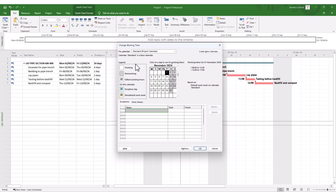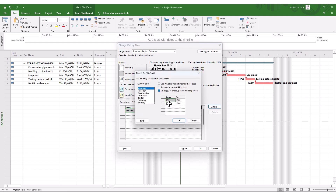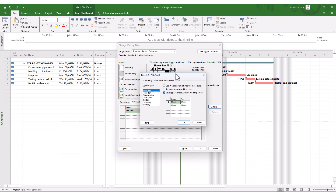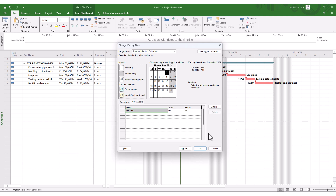Mostly, a project manager or client representative will say your calendar isn't accurate — we're going to work from 7 o'clock on a Monday, for example. So you go to Work Weeks, click on Details, and this is where you can change the specific working times. A lot of project managers will change this, setting the start time to 7 and maybe working up to 6 or 9 at night, or changing shifts. I'll just change one for the sake of this exercise and click OK.